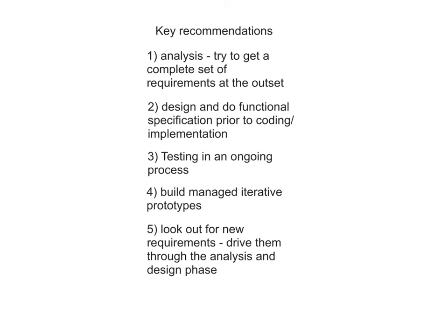Number 5, while you're doing your prototypes, look out for new requirements. Obviously, they will probably just crop up from time to time, but try to make the effort to drive these through the analysis and design phases rather than just code them on the fly, because that's likely to have impact. And also, if you do introduce something that you think may have some impact, then do some regression testing, as